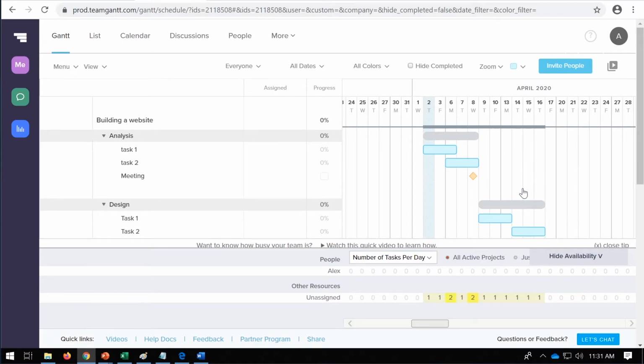So in a Gantt chart, what else you might see is something called dependencies. These are normally lines connected from one task to the next. Dependencies specify the relationship between tasks. Although I've already mentioned we can read this as this task needs to be done first, and then you can see this task starts just before this first task ends, we can also make that clearer utilizing dependencies or links between these two tasks. On the Gantt chart, dependencies appear as lines or links between the two tasks.